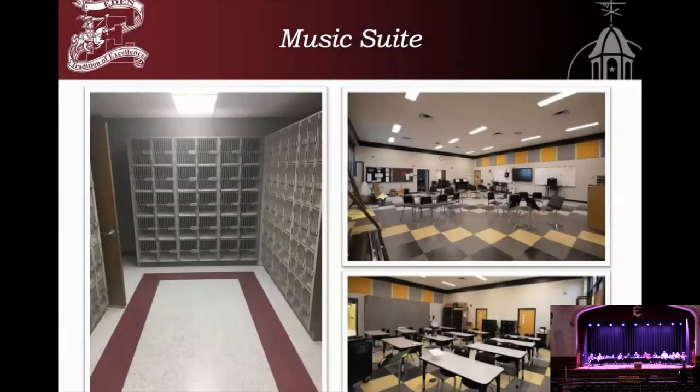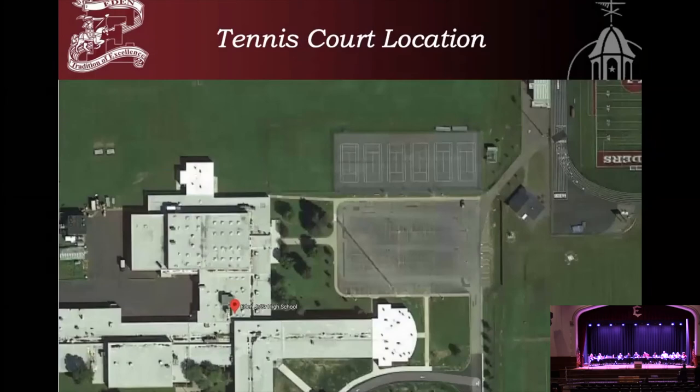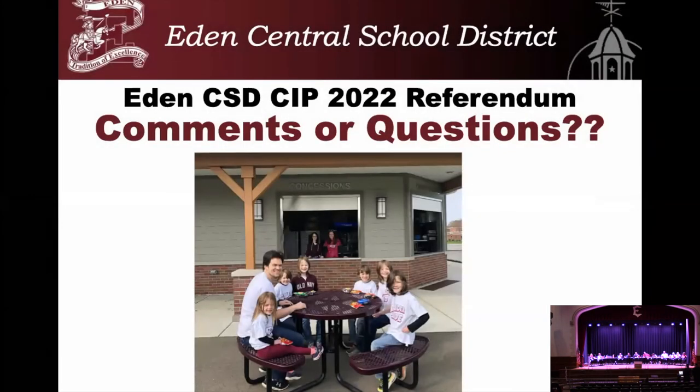Any other questions that we could address for you tonight? Have you guys bid anything of late? I know we're a year plus out before any possible bidding, but what are the bidding results coming in right now? I just know building materials are through the roof. Sure. We just opened some very successful bids within the last couple weeks. The interesting point is that contractors are being pretty aggressive, because they're all concerned, like every one of us, about keeping their employees employed and getting backlog on their books. So we're seeing a pretty good increase in folks coming out and putting bids in on bid day.